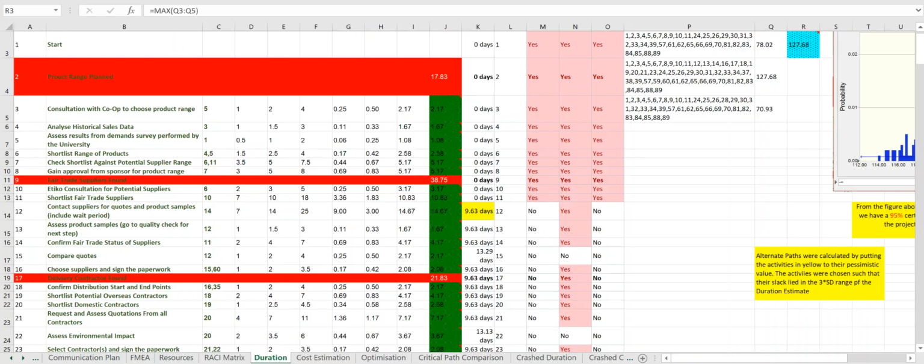In this video we'll be looking at the Excel sheet and looking at crashing and how they link together. The key issue with crashing is you've added additional resources. So if you've done leveling before and you've left leveling on and you're crashing an activity, you may have to take leveling off and have a look at what's actually happening with the different tasks. But we'll explain this as we step through the video.